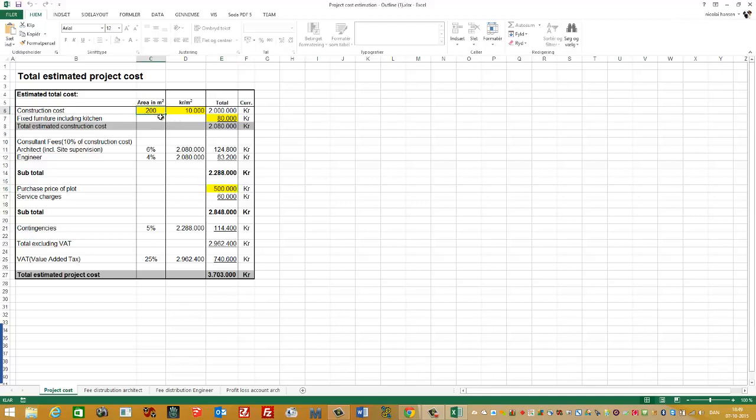First I'll put in the area of the house. In this example I've just used 200 square meters. Of course you will use your own value. So now I need to find the square meter price.